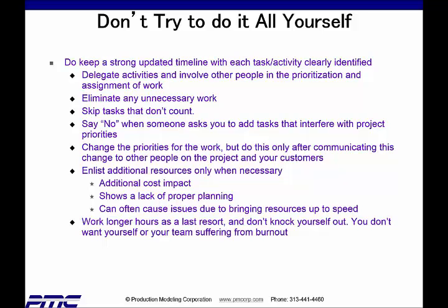Enlist additional resources only when necessary. Enlisting additional resources causes additional cost impact and shows a lack of proper planning. It can often cause issues due to bringing resources up to speed.